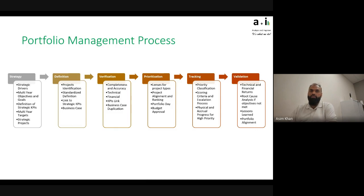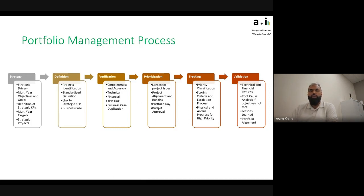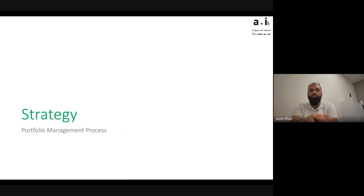Here are the six stages. Strategy is where it starts, then project identification and definition. That leads to the verification and prioritization stage — verifying the project information is good enough, that it fills the needs, and prioritizing based on available funds and resources. Finally, once a project is prioritized and approved, there are two further stages to make sure projects stay on track and deliver what was promised. We'll cover all of these in different webinars; the first two are my focus today.